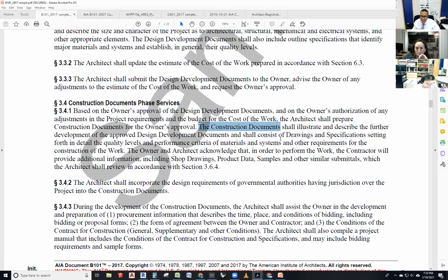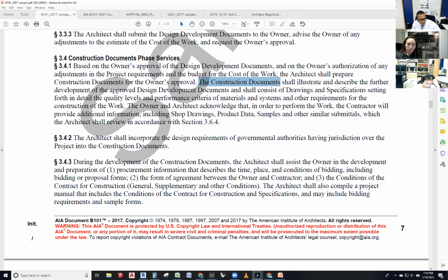All right. It also does tell us that there's gonna be more stuff. This is not everything, right? We're gonna need shop drawings for those cabinets because the architect's drawings are not supposed to be a substitute for shop drawings. We're showing design intent. Shop drawings are supposed to show construction intent. How is it built intent? Buildability intent. All right. So it's saying that. There are other things that we're gonna be including in here, guys. And I'll tell you more about it in a minute.